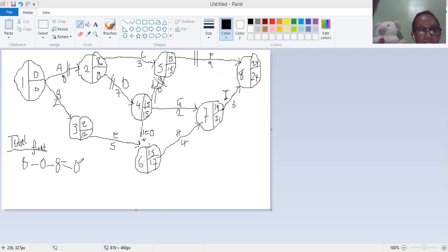If an activity is critical, a good example being our activity A here, then at no point should its total float be anything other than 0. Reason: we have no time to delay a critical activity, because by definition, any small or big delay on a critical activity would definitely mean a delay of the overall completion time of the project. So it is important that we consider